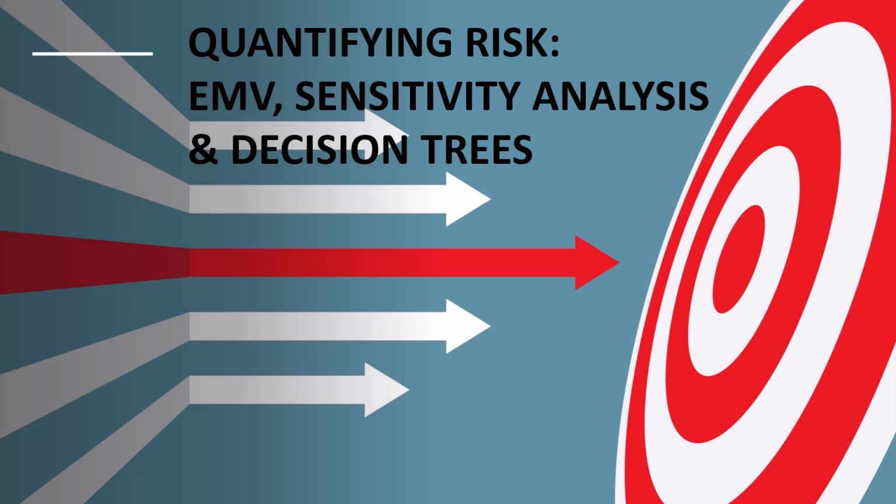That calculation directly helps you figure out how much contingency reserve you might need. So it puts a dollar figure on the what ifs, helps you budget for uncertainty. Exactly. It provides that baseline financial picture of the risks. It's actually the foundation for decision trees, too, which we'll get to. Got it. So EMV gives us the big financial picture.